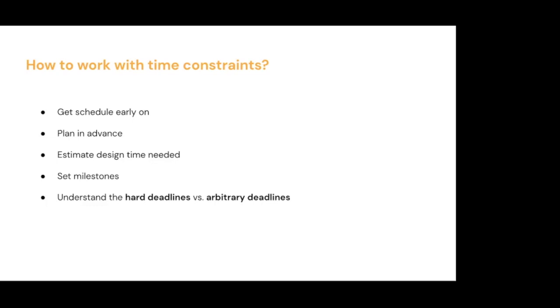Another thing I would say is to ask questions to figure it out. Do you need it in 2 weeks because engineering is starting on it, or is it for the first draft, where we still have the opportunity to refine? Understanding the deadline is important. Once you understand that, you might need to push back, because the development team might say, we need design in 2 weeks because we need 4 months to develop. That's something you and your manager need to work out with the dev team, to make sure that everybody gets a reasonable amount of time to do the task they need.